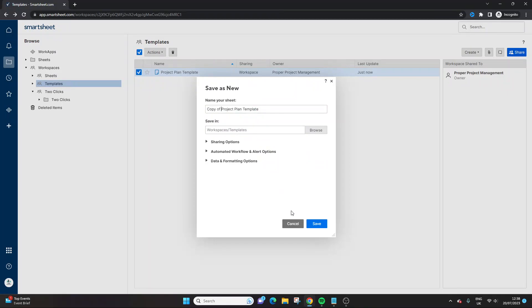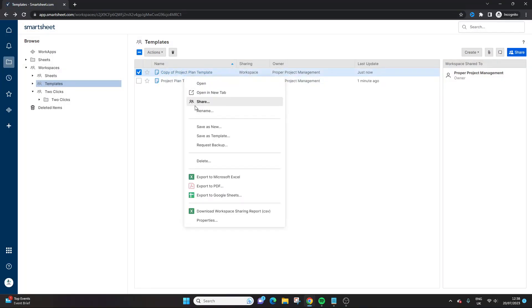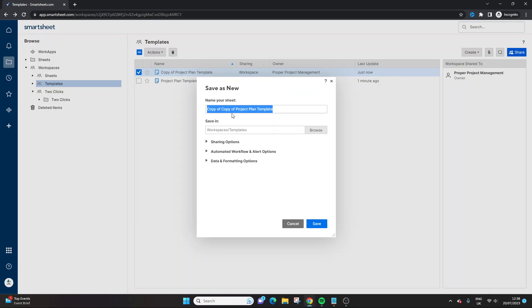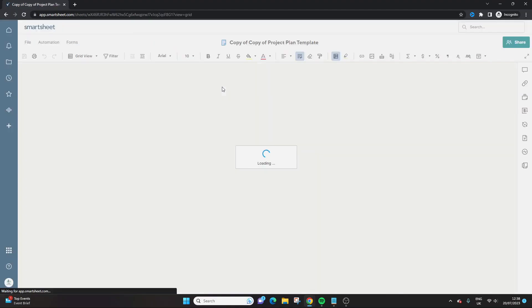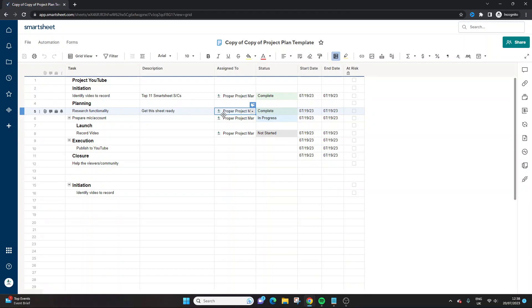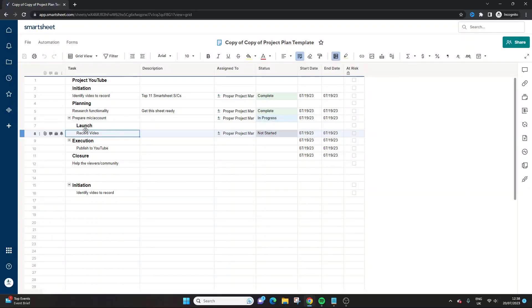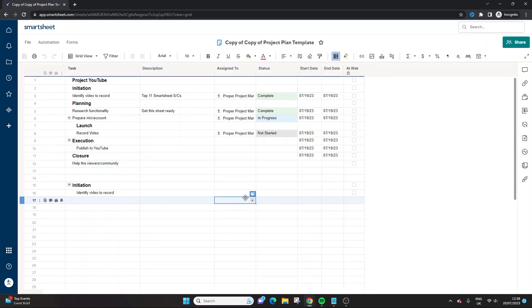You know, we could do this. We could then do, of course, we will be changing the name. But we've even got a copy of a copy of, but we could keep doing this. So let's just say this was project A, project B, project C. Now one of the main tips here is to really optimize the first template that you do. That's very important, because it will save you a lot of time. So in this example, say this task was only relevant to one particular project plan, I would probably remove that out before we did the save as new. Because I don't want to go into each one and have to delete it off, if that makes sense.